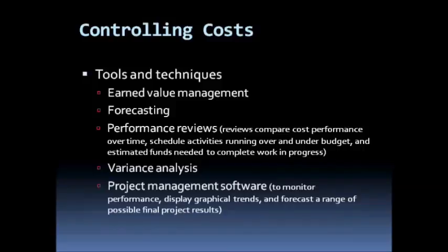Tools and techniques we could depend on in controlling costs: earned value management, a very important technique that could be used to monitor cost performance on our project. Then based on the measurements, we could draw forecasts to know whether our project will fall within budget or will run over budget.